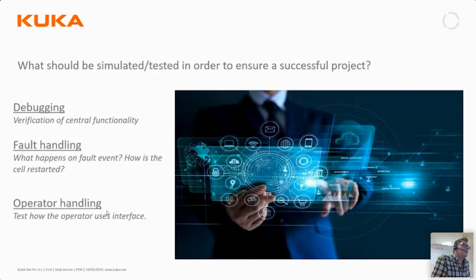And perhaps even equally important is to let the customer's operator try out your user interface. Because often the programmer who has created the user interface has an idea of how the operator should behave. But when it comes to reality, the operator doesn't behave that way. And thereby ending up in strange scenarios of situation which the programmer hasn't really planned for. So letting the operator itself try the model or the simulation model is in many times very, very effective.